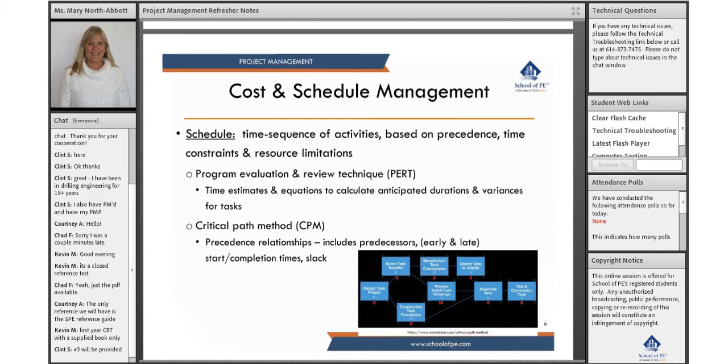So really kind of saying, okay, what's our drop dead date or our time to completion date? And that may depend on saying, hey, the budget is only available up until January of 2021. And so you kind of have to work backwards and say, our critical path is this. These are the things that take the longest. And so you build in that time and look when you need to get started. Obviously, if you're working offshore, doing offshore drilling, you're going to have more lag times built in there, and times to get equipment out there, what could go wrong, whether it be weather, everything else. You have to factor all of these into play.